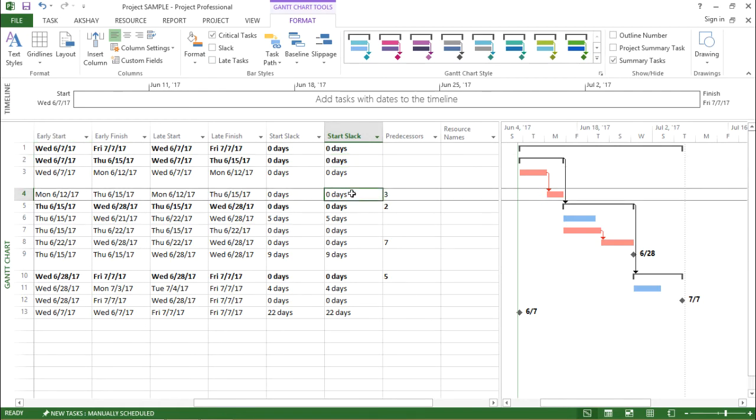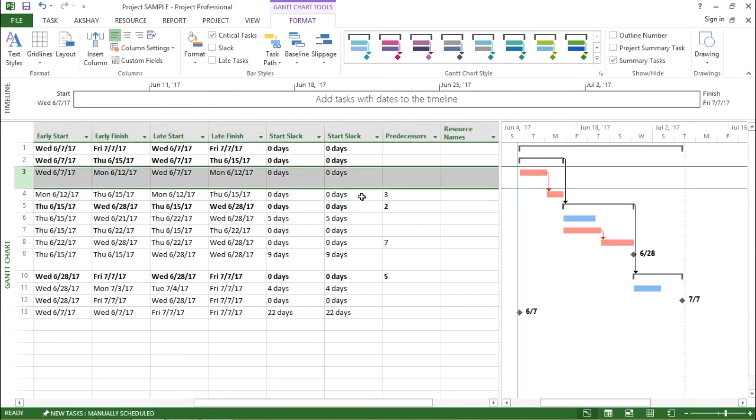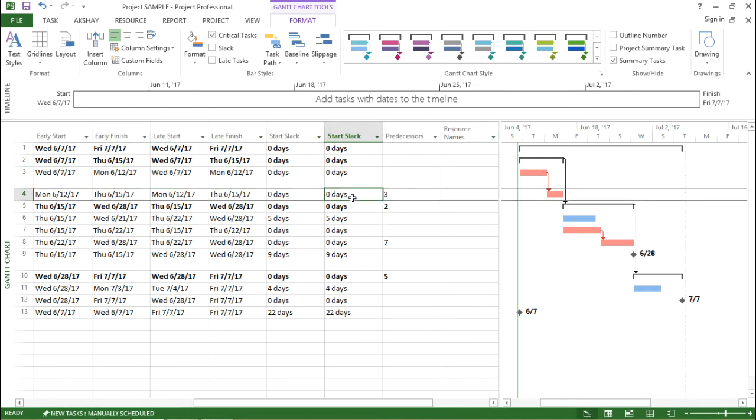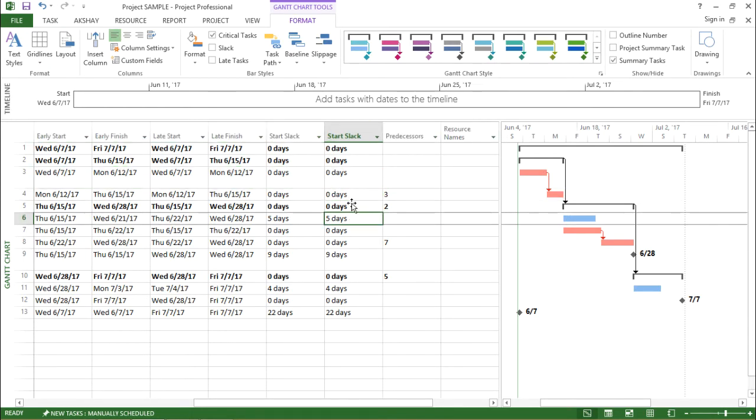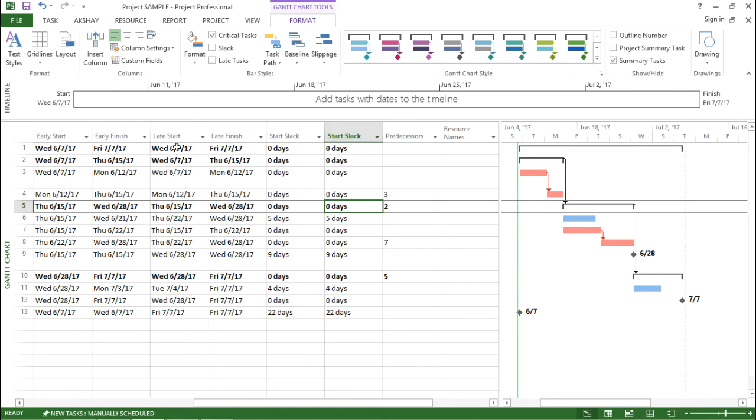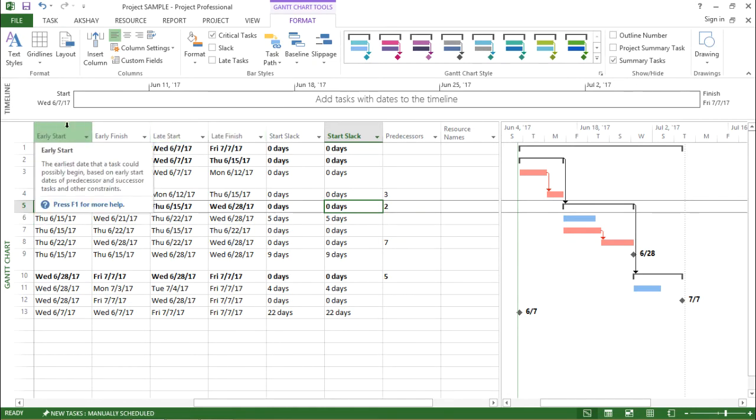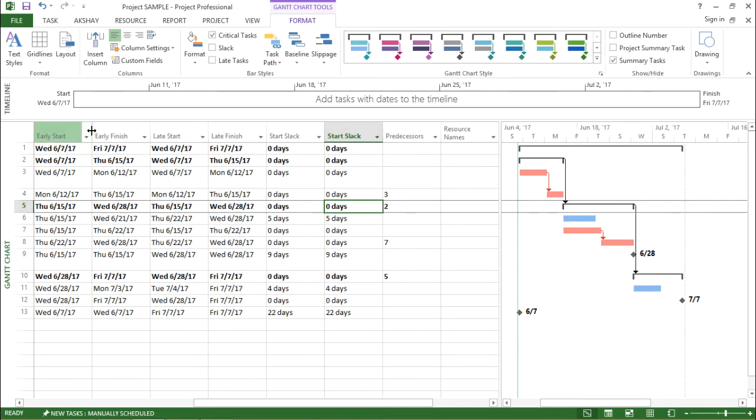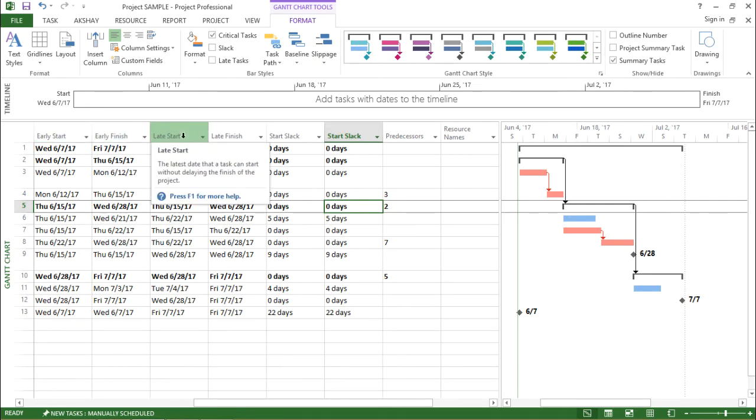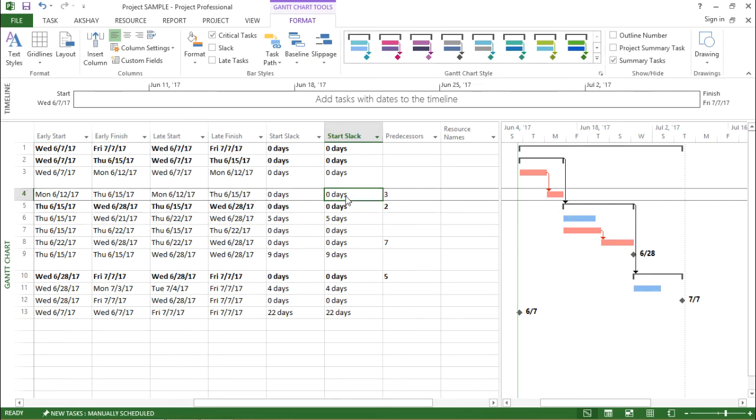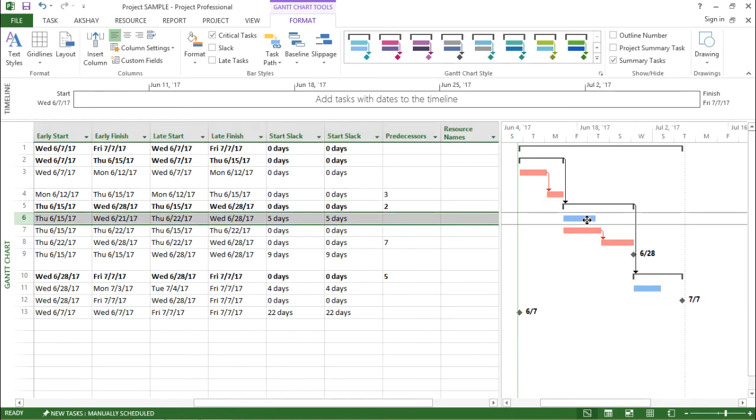Now if you must have noticed, for critical tasks, the Start Slack is always zero. The reason being, for critical tasks, the Late Start and the Early Start are equal. So the date of Early Start and Late Start is equal. That's the reason I am getting the Start Slack as zero. Now if I move to the next blue bar,